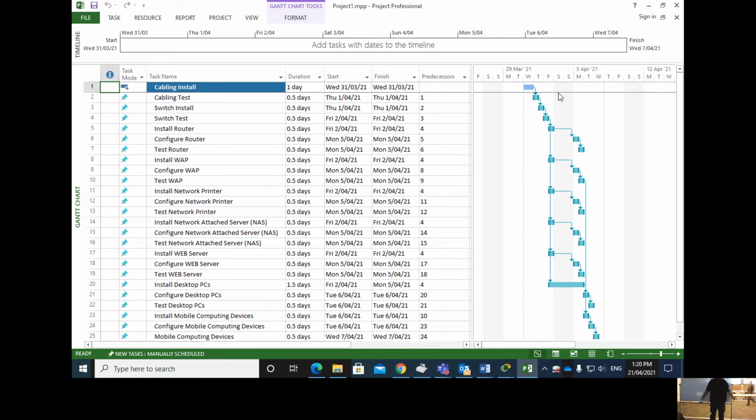So we only need 2 goals. Apparently. So you can go 5.5 days. So let's keep it all in days. All right, let's give ourselves 5 days when we did our drawings and all that, worked out where to buy the stuff. Give ourselves 5 days for that. Once we know everything we're going to buy and how we're going to implement it, 5.5 days to put in the project. And then at the end to test it and evaluate the solution, you just have a day for that. That's basically what we're doing at the handover. We're testing the solution now. All right, so maybe let's say 1 day.